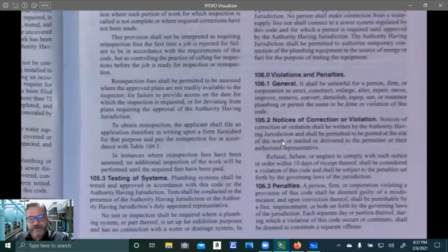And the request for information came back. I proposed an alternative method of installation in that RFI. Came back, no, you do not get to change this. It's the way we want it, and you're going to do it. I replied back to that RFI with a follow-up, a revision. Please, and I gave the code sections to where it was a violation.